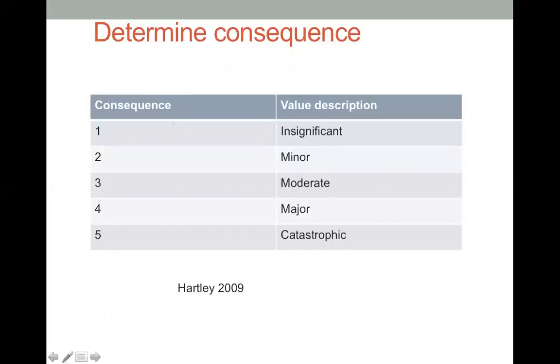And again, we can rate them from 1 to 5. Again, I would recommend you use 1 to 5 in terms of writing the consequence. 1 being insignificant, 5 being catastrophic. So if we say that the hazard in the organization, in terms of fatality or consequence or impact, is catastrophic, it may kill someone.